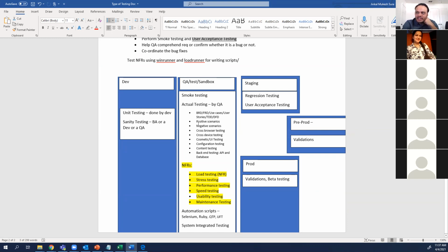But at the end, whatever testing you have done needs to be tested across all the applications being used by your customers, and make sure, which is called regression testing, right before the release. Companies can usually have one release every 2 weeks in Agile, or one release every 1 month. In Waterfall, one release will be after 9 to 12 months. In regression testing, we're doing all the functional requirement testing and the non-functional requirement testing together. Plus, you also test the applications that could get impacted with this new functionality that you've created.